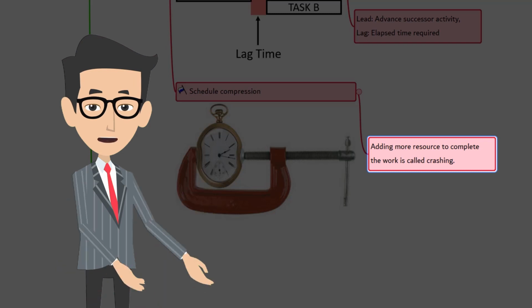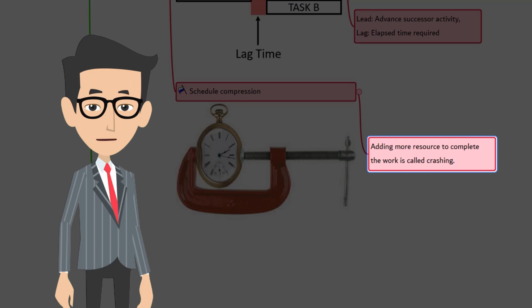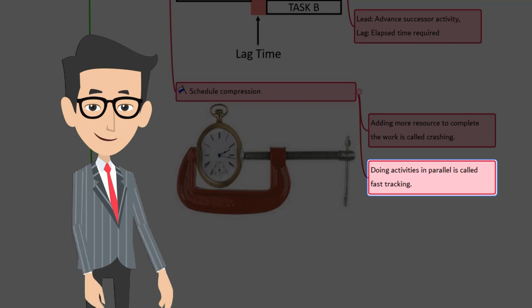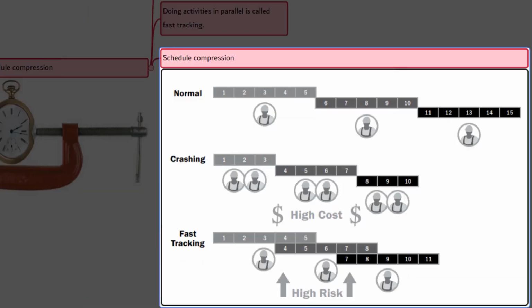So, you started the construction with the blueprint drawing. In parallel to that, you start working on making the architectural drawing, including the interior. Here, you carried out both construction and architectural drawing in parallel. This is called fast tracking. Let's look at picture 6.19 from the PMBOK guide.